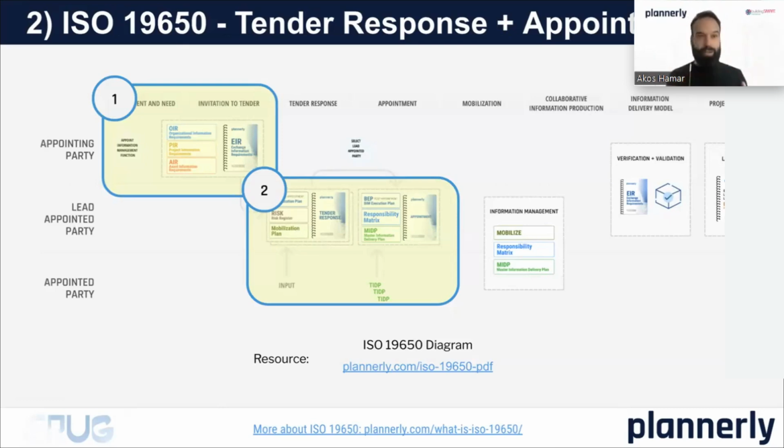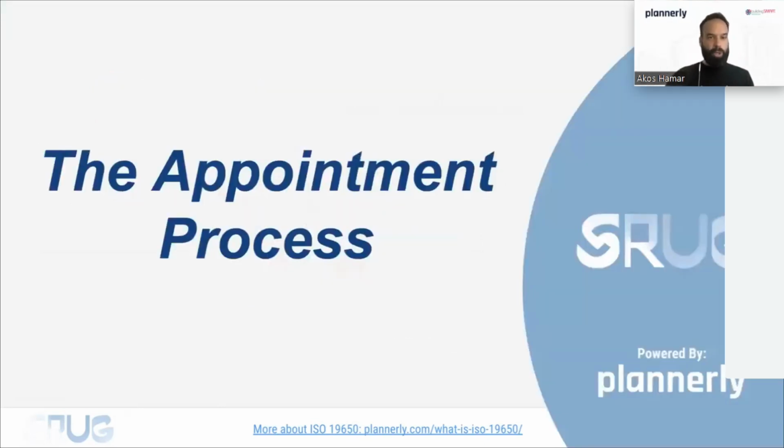So maybe it's not relevant for everyone. If you are a supplier of information, a designer, in a perfect world, you should be receiving these invitations for tendering. But if you are representing an appointing party, a customer, these are the documents that are going to be put together in the very beginning to create the EIR, which is in the end going to be the invitation to tender. In the next step, we assemble together a tender response and go through the appointment process.